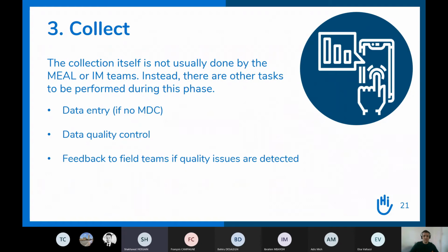At the end of the day, if we go for paper-based data collection, the supervisor checks, on a sample basis, all of the data collected by his or her enumerators. If they get something wrong, then we need to have some refresher. Might be there is some gap in the training during data collection and the context of the areas.